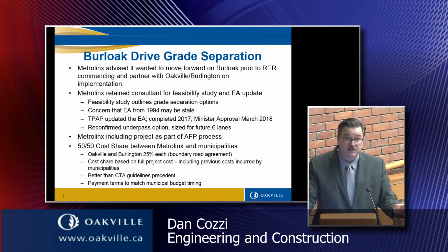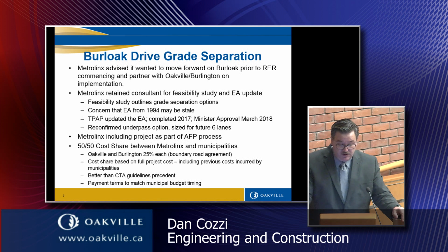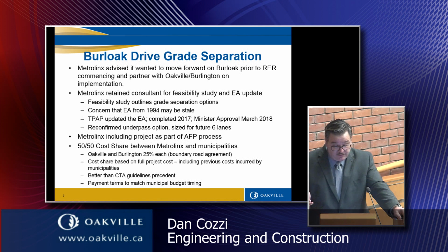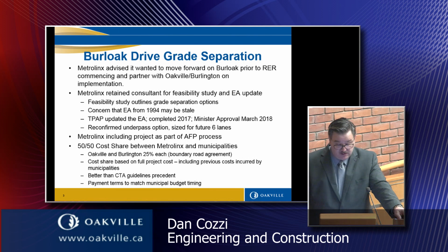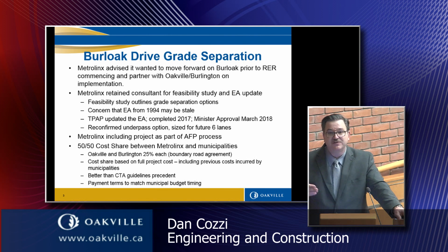That, in staff's opinion, is actually a very good deal. And I would say that it is better than what the precedent CTA recommends. They've also agreed to let payment terms be such that it could match our municipal budget timing. So if our budget wasn't ready for a few years, we'd pay them when our budget monies are available.